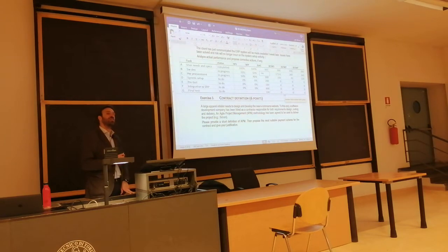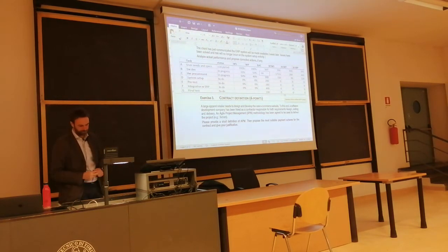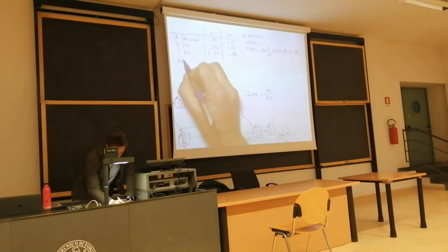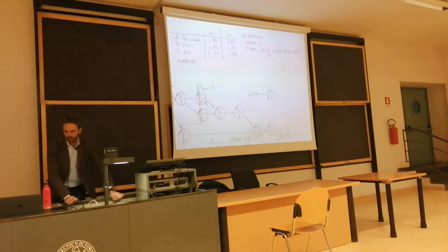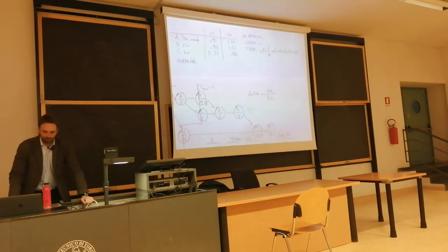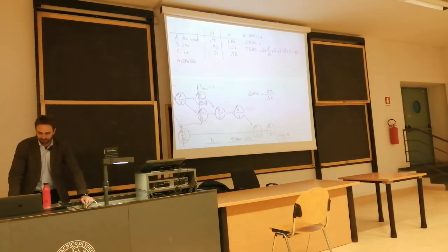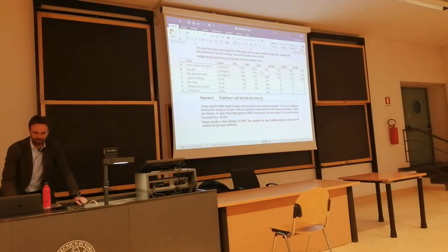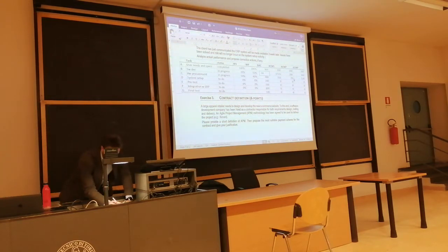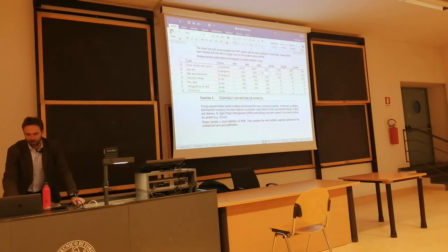How much is the average cost index so far? Average cost index equals the total budgeted cost of work performed over the total actual cost of work performed, which is 300 plus 360 plus 120, 680, over 330 plus 280 plus 70, which is 680, right?